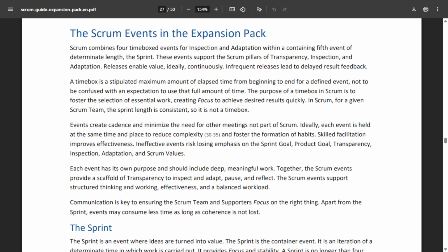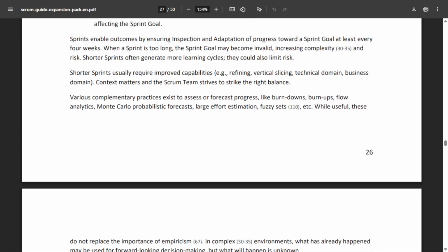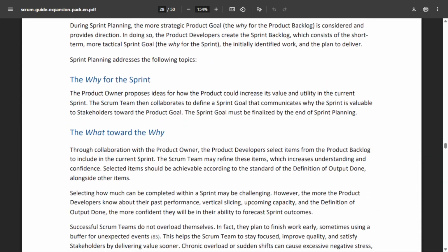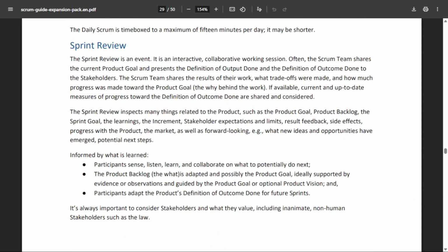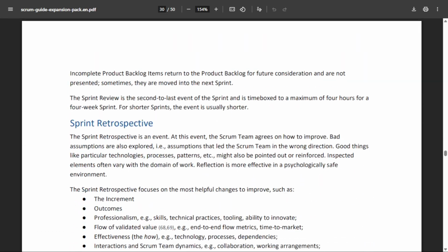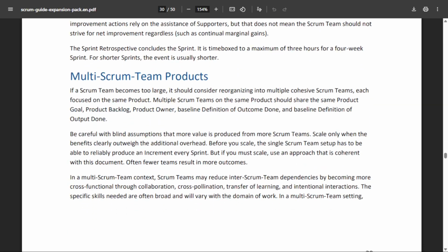Developers decide execution approach. We have the daily Scrum, where we make quick alignment, adjust the plan to stay on track. We have the sprint review, collaborating with stakeholders to inspect outcomes. And lastly, the retrospective. So there they are, sprint planning, the daily Scrum, the sprint review, and sprint retrospective.